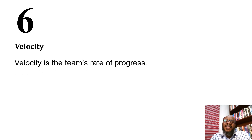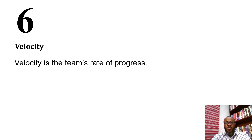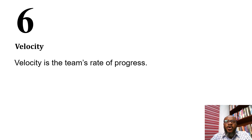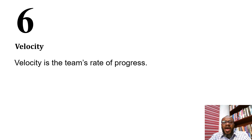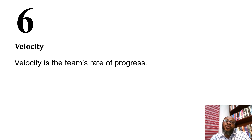The next concept is team velocity. Velocity is the team's rate of progress. Understanding the development team's rate of progress is important for sprint planning, so we know how to assign work. It's not good when the team is overburdened — that can lead to burnout and loss of morale — nor should they be underwhelmed. Knowing the team's velocity allows us to plan work accordingly.